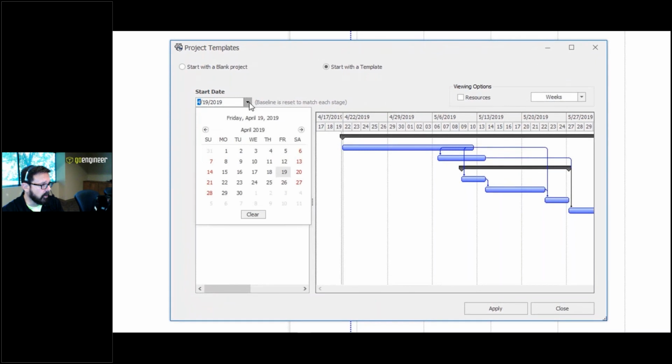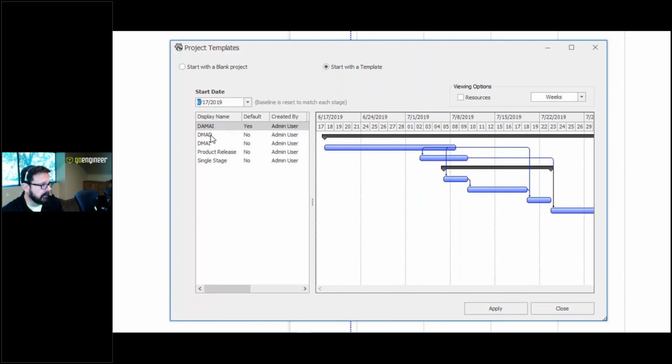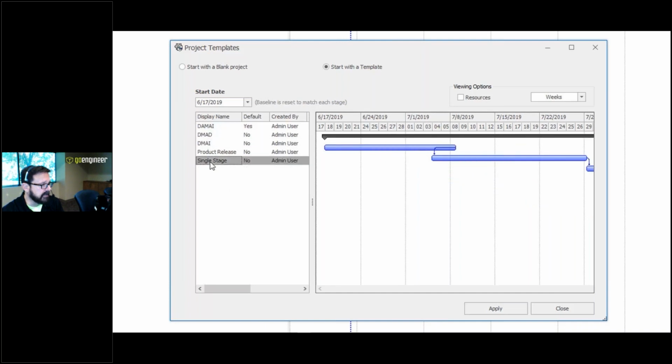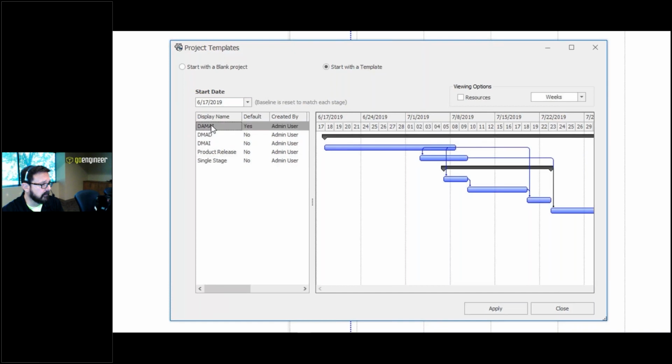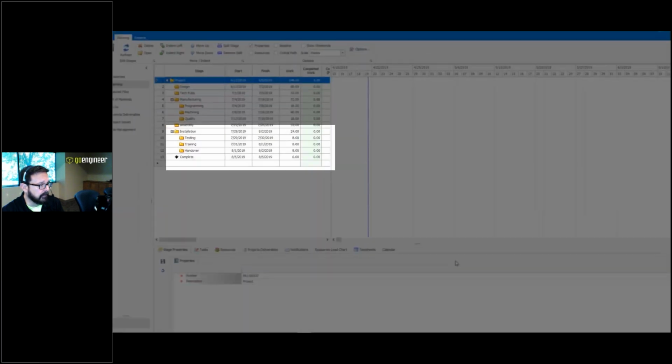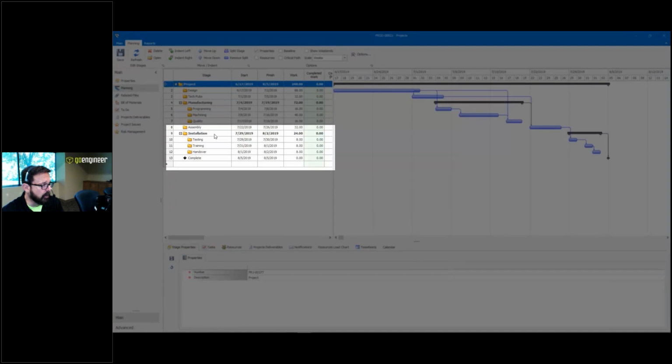So in our project management, if you look right here, let's just say, here's our new project. Let's pick a start date. And there are different templates. And we'll pick my template and take a look right here. Even if we're using a template, we can go in and make changes to the verbiage in the Gantt chart. And if the template doesn't include something we need to do, we can just add a new line item.